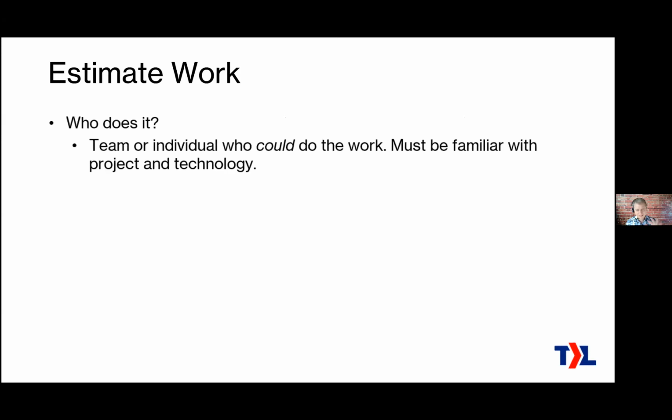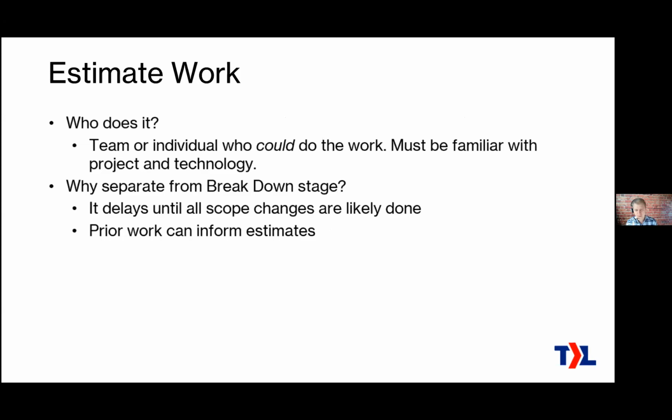So who does this? Again, it's someone who could do the work themselves, right? They've got to be familiar with the project and the technology, an engineer, or yourself if you come out of a tech background. And why do we separate this from the breakdown stage? Well, it delays this work until all the scope changes are likely done, and the work that you've done before can inform the estimates that you're making now.